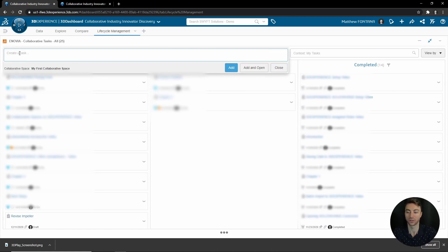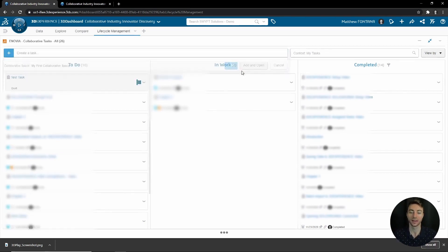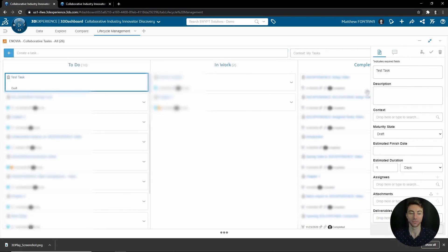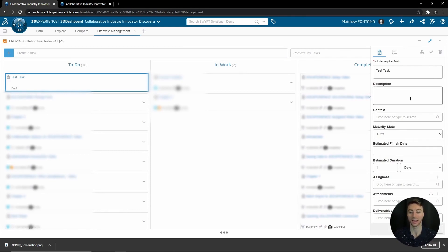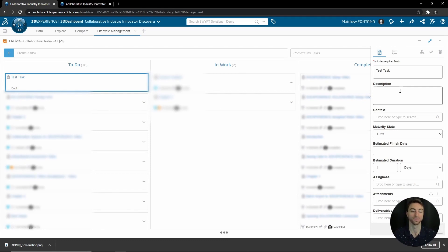If you were just going to add a test task, you can Add and Open and it will automatically open up the details pane here. If you did not select Add and Open, you just selected Add, it would add as a draft and you could then later go in and enter these details before moving it to To Do.